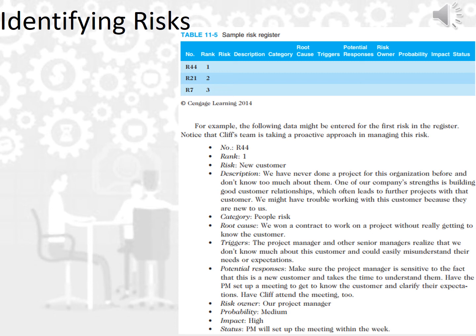In the column of potential response, make sure the project manager is sensitive to the fact that this is a new customer and takes the time to understand them. Have the project manager, or PM, set up a meeting to get to know the customer and clarify their expectations.